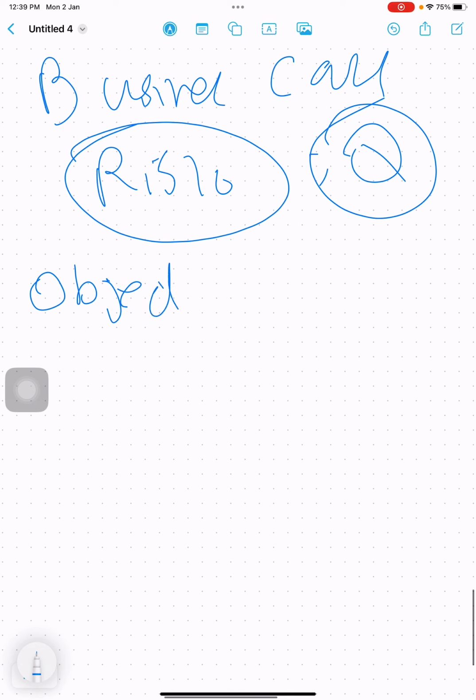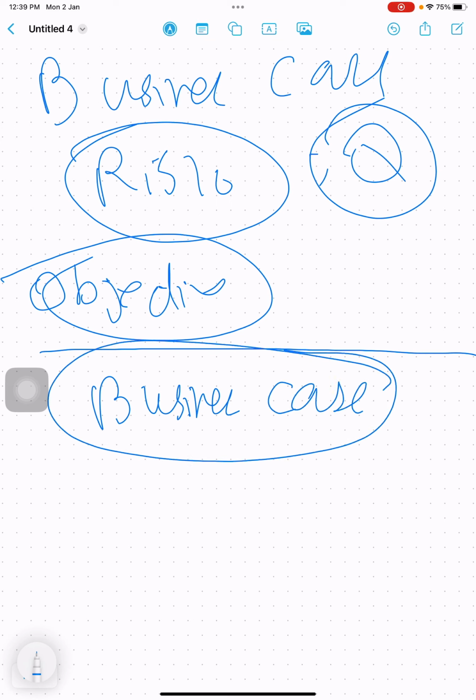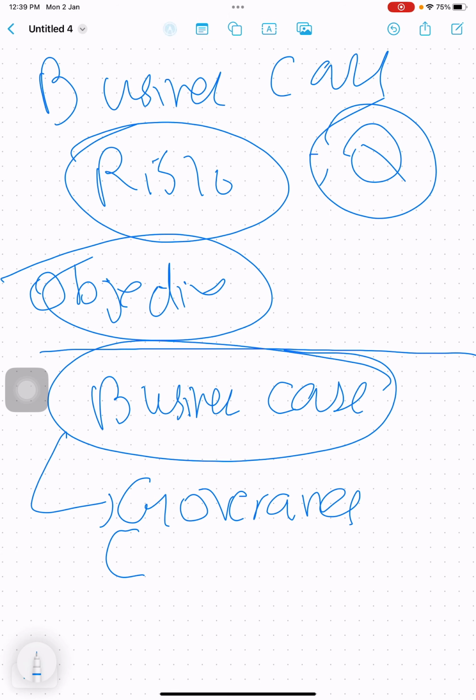And the business case sometimes even goes up to 20-30 pages, but that is not for the PMP, that is more of a program level. This is your business case. We show it to the sponsor, and basically the business analyst and sponsor make it. They can show it to the governance board. If the business case is approved, then we can talk about it further.